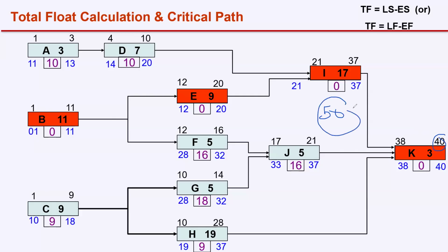But in the project charter, we agreed to finish this project in 50 days. That means from day 41 to day 50, even if you delay the critical path, there is no impact because you have the project float. The whole project can be delayed for 10 days. But this usually happens only in dreams.